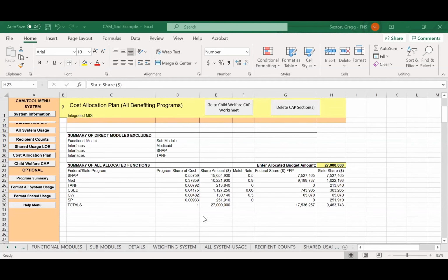Right. But another thing I wanted to point out is that when we're talking about costs, we're talking about allocating functions, not services. I've seen some examples where a state wanted to say, well, I'm going to add a line ID&V service and put it in there as opposed to a function. We're focusing on functions, and then, for instance, staff costs are allocated as part of the shared cost process, unless they have somebody who comes in and only is responsible for one function, one direct charge function.